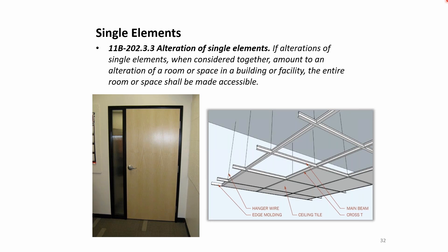Another example: a door frame and hardware in an office that needs to be replaced due to wear and tear is considered a single element — a complete system — and does not require the entire room to be made accessible. Similarly, replacing a ceiling including grids, wires, and ACT tiles would all be considered a single element if you're replacing the ceiling as a system.